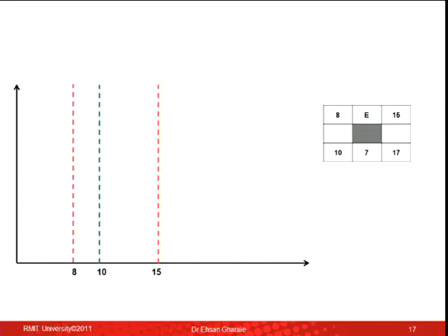And if this is the late start and this is late finish, the activity can be done at any point of time between these two starts. So it can start on day 8, it can start on day 9, and it can start on day 10. And this is the flexibility that we are talking about.